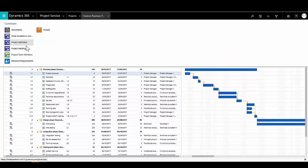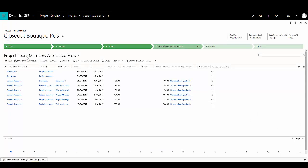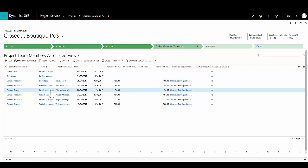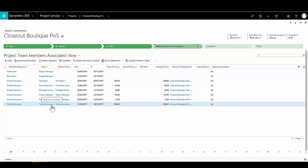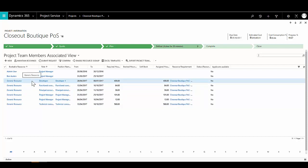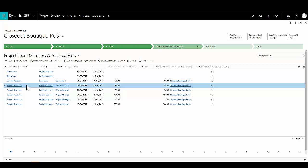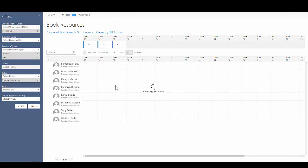Now we've completed our initial project plan and assigned roles to activities, and CRM has generated our project team. We can start making resource bookings for individuals who are going to carry out these activities. Because CRM built our project team, when we go to the project team view we have a set of generic resources — one for each resource needed — each with a role and the dates we need them. Selecting one of these resources, we can choose the option to book an individual, using the hard book option to choose someone available and book them directly onto the project.